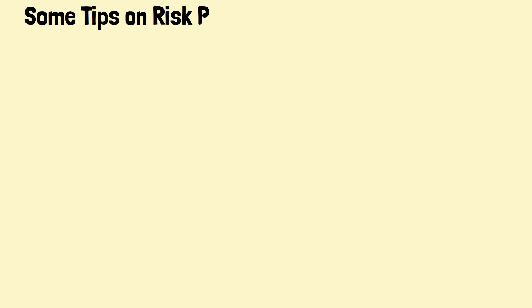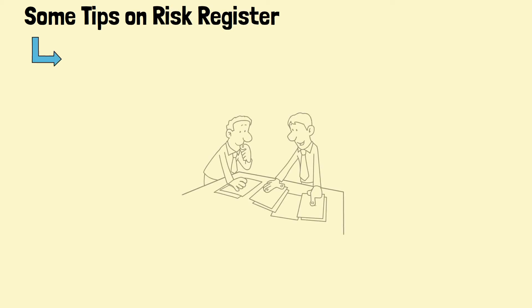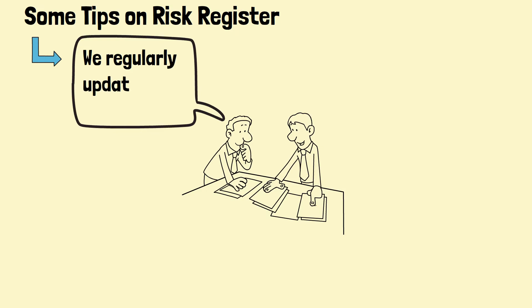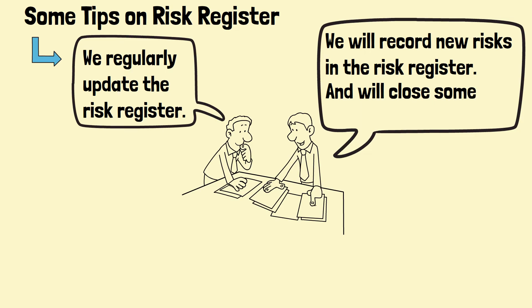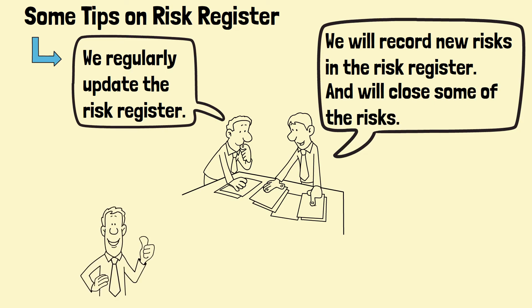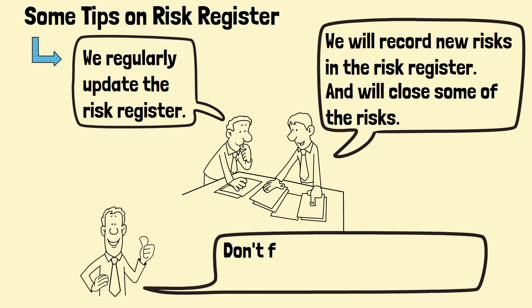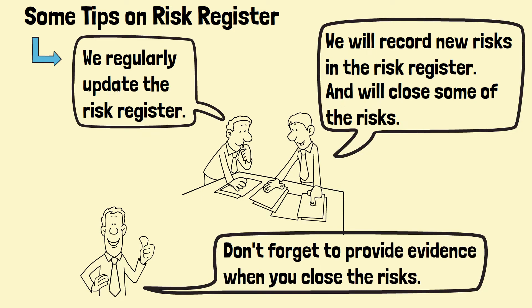Preparing a risk register cannot be viewed as a one-off exercise. It should be treated as a live repository and updated regularly. When a new threat or opportunity is identified, it should be recorded in the risk register. Also, when a risk is closed, its status should be updated as well. Evidence must be provided in the audit trail column to support the closure of the risk.